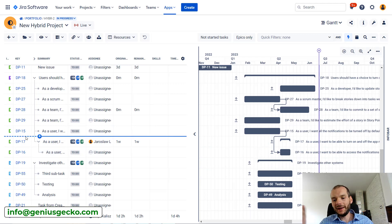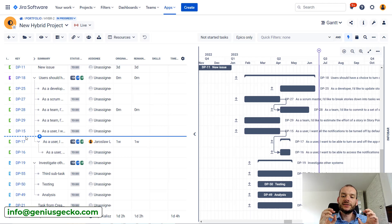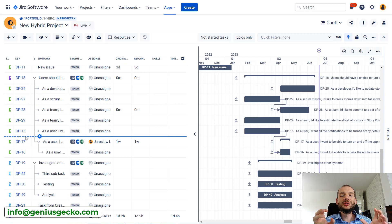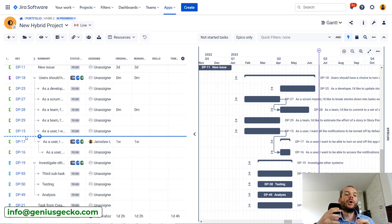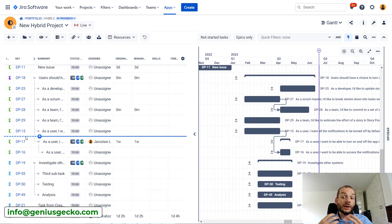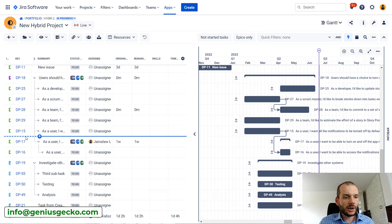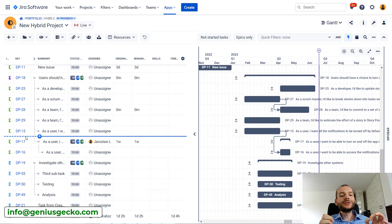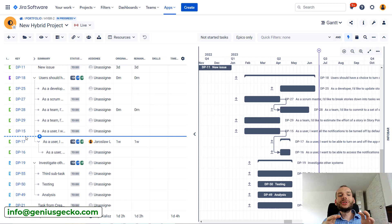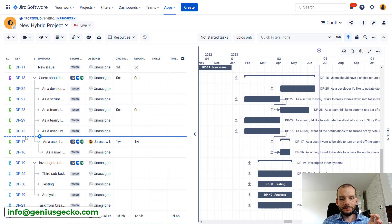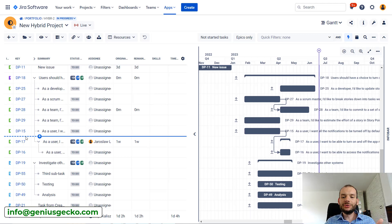So usually we want to update these plans in a more controlled way. For example, if a new change request comes in, you may want to first create a draft of the plan and after it is approved, make it the live plan.